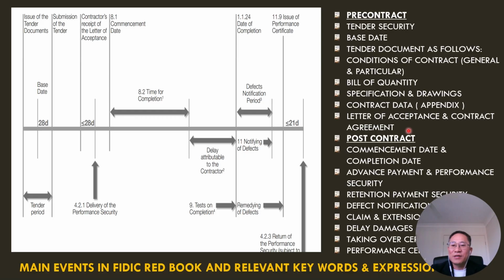A letter of acceptance is quite important because it puts all the important or crucial conditions in terms of contract conditions and price, and any amendment that both sides have agreed during tender negotiation. So this is the letter of acceptance, and the pre-contract stage has been completed.